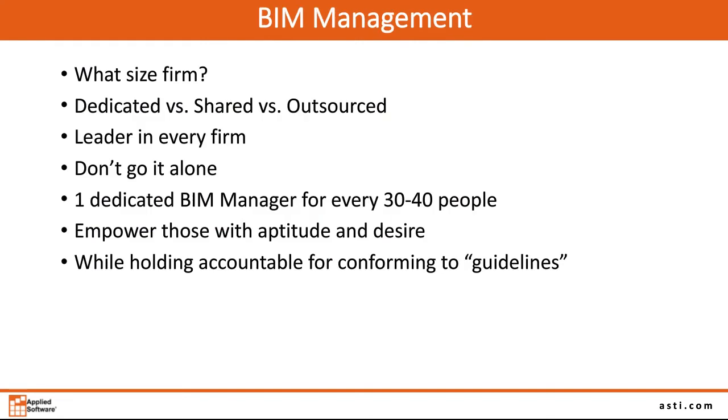Also, BIM management needs to be considered. Who's going to manage this implementation? In smaller firms, a lot of times someone that does billable work will also have time allotted to do the BIM management, hopefully. Unfortunately, a lot of times the billable work takes precedence and it doesn't happen. Larger firms, though, usually can justify and should justify a dedicated paid BIM manager on staff. And those are the people that do the internal support for your implementation going forward. And at some point, get you to the point where you are no longer dependent on that third-party outside resource.